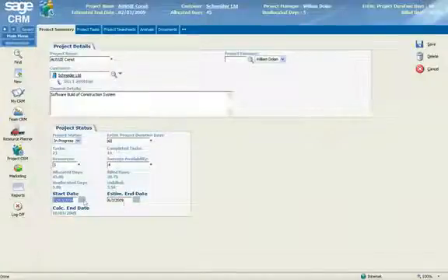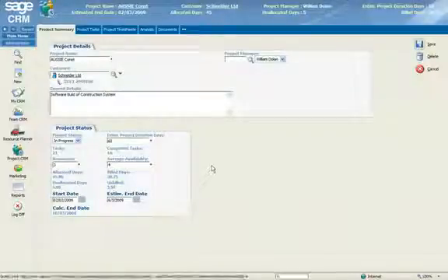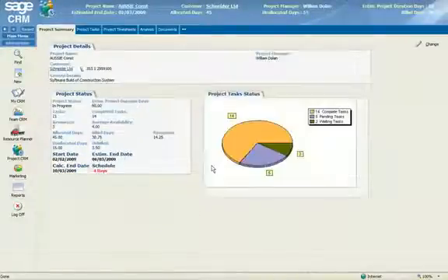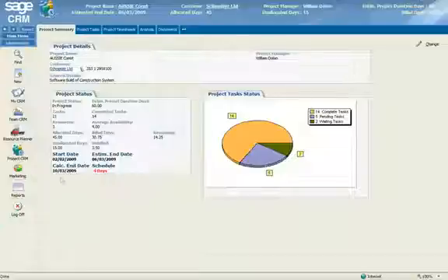So you'll notice these dates are changing down below here as we're making the changes above, because for 60 days and 3 resources and average availability of 4, it's saying that from the date that we started this project, it would take until the 6th of March 2009 to actually complete that project. The idea of this is that we get a cross section, an idea of what we can do based on what we're saying the average availability is, and the calculated end date is what we are actually doing based on the drawdown of timesheets. Timesheets we'll explain in a moment.